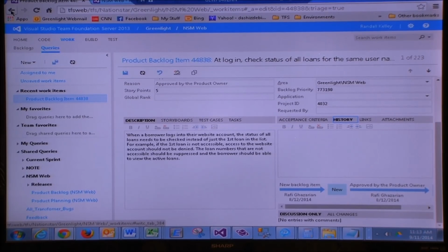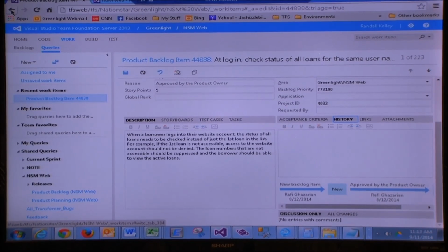But now Pam's coming in from the Harold level where, we're getting stuff done, but do we have enough bodies or do we have too many bodies? That's all they want to figure out. Or do we need to ramp up? How much work is actually, what's the backlog of work? And a count of backlog items doesn't really get you the backlog of work, because if we're chasing numbers, you're like, oh, you want me to give you more backlog items? Here you go, I can split this into 5 for you. I can make a task of a backlog item really easily. So there's got to be some transparency.